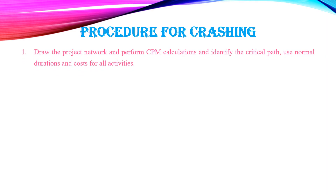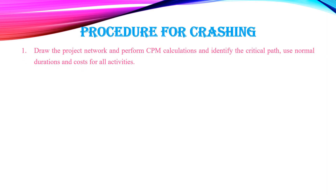Procedure for crashing: Step 1 — Draw the project network and perform CPM calculations to identify the critical path, using normal durations and costs for all activities. Step 2 — Compute the cost slope for each activity using the equation: Cost Slope = (Crash Cost − Normal Cost) / (Normal Time − Crash Time).